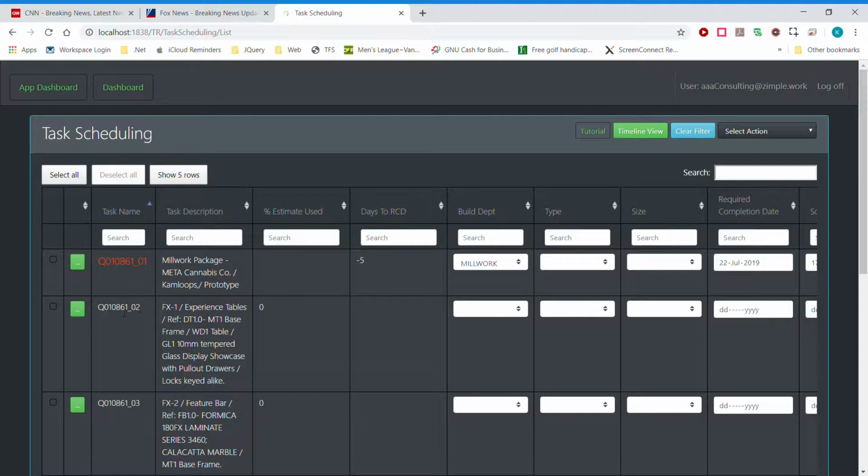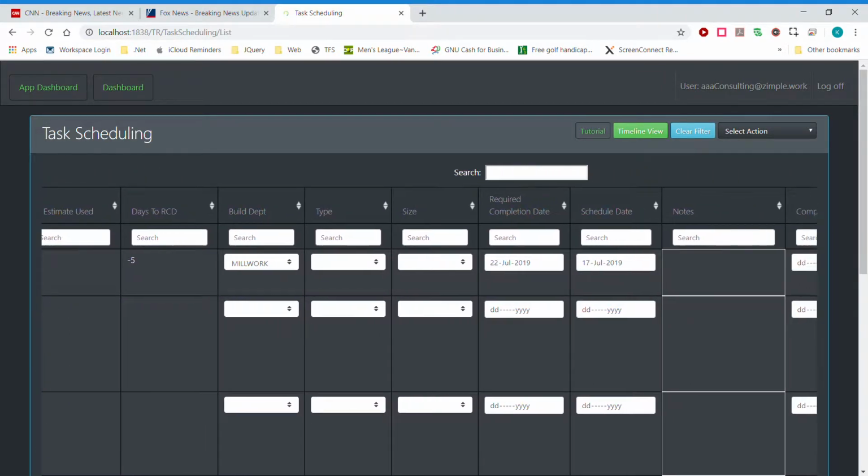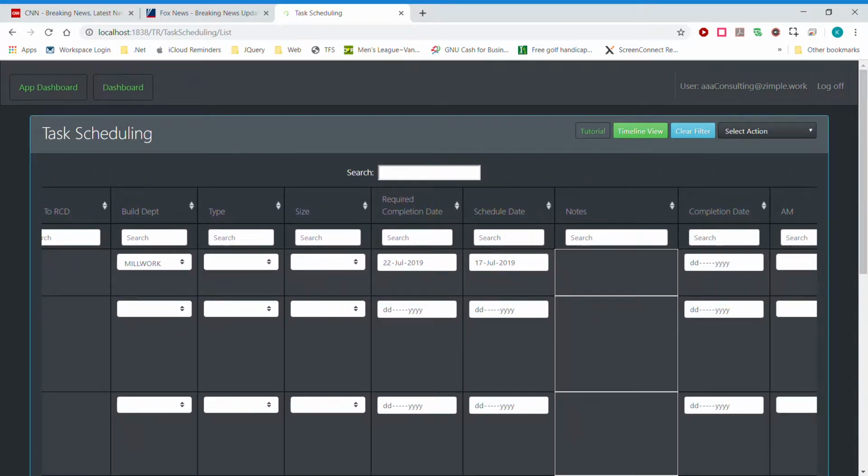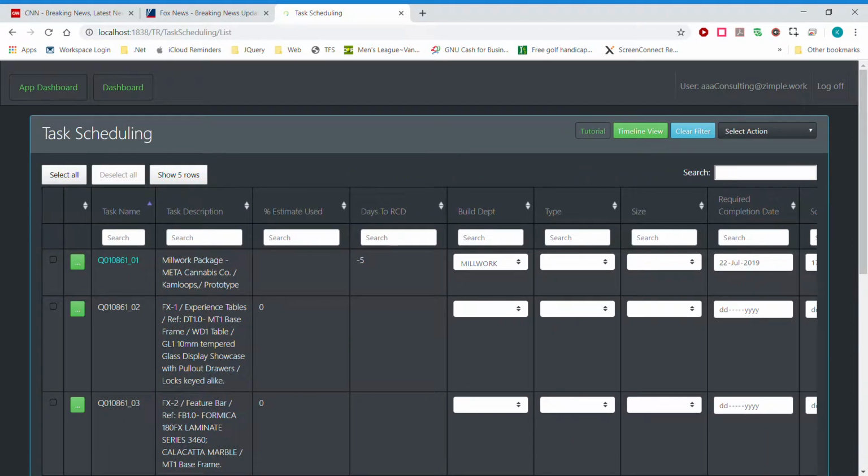So if I go to the O2 and O3 and I actually mark them as complete, I give them a completion date. So I'll give that one completion date on the 15th, and this one on the 17th. And then we go back here. You can see it's changed color to blue. So the blue means it has prerequisites, but they're all complete, so you don't have to worry. You can start working on this thing.